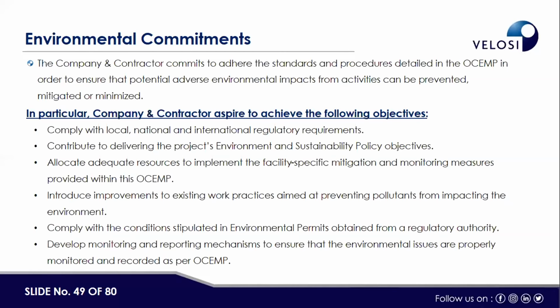What elements can be added to an offshore EMP compared to an onshore EMP? See, in the CMP or in the EMP with respect to offshore and onshore, the impact related to the marine environment cannot be significant if the project is totally onshore. But in offshore, there will definitely be an impact on the marine ecology and on the marine water. So in an offshore EMP, we have to identify the impacts related to the marine environment and accordingly propose mitigation measures to control those impacts. But in onshore, those impacts are not relevant as compared to offshore.